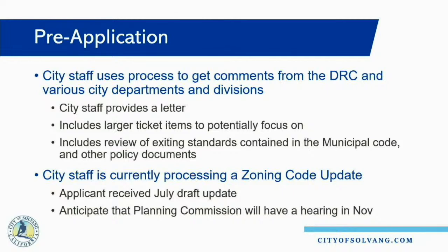I've directed city staff at this point to revamp the pre-application process to instead do an internal review by all departments instead of just a meeting. So that way the city staff gets a 30-day review, if not a little bit longer, to review all the plans and then provide a comment letter back to the applicant and still hold that meeting as an optional meeting to the applicant. So city staff provides this comment letter, and in this instance, we're taking this project before the design review committee to also solicit their input.